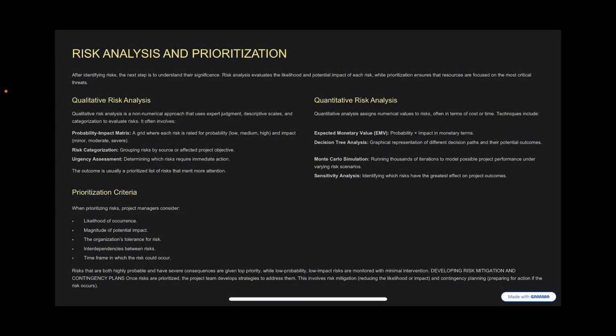Then we have the Monte Carlo simulation. Again, I'm surprised I'm having it. I really should talk about it. Now, the Monte Carlo simulation means running thousands of iterations to model possible project performance under varying risk scenarios. We have the sensitivity analysis, identifying which risks have the greatest effect on project outcomes.